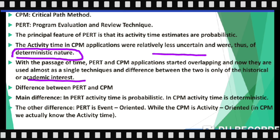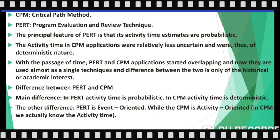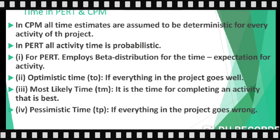As shown in the fifth point, the main difference is that PERT activity time is probabilistic — the activity time is not certain — while in CPM it is deterministic and you know the exact duration of different activities. The other difference is that PERT is event-oriented while CPM is activity-oriented, because in CPM we know the actual time of activities.